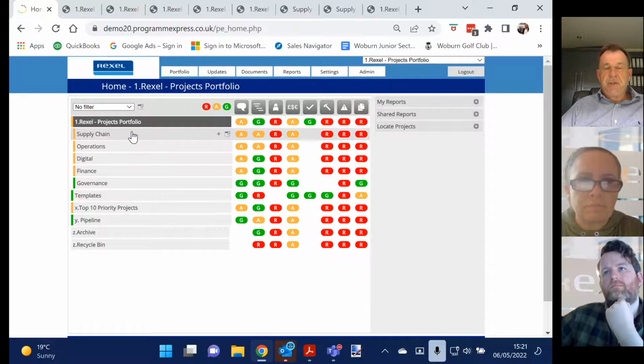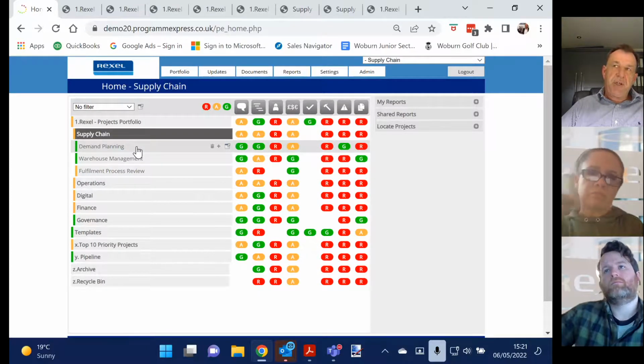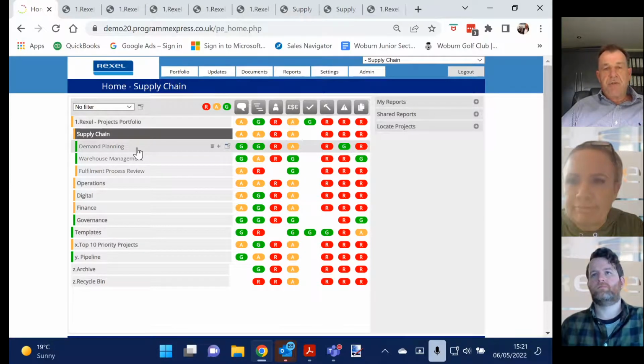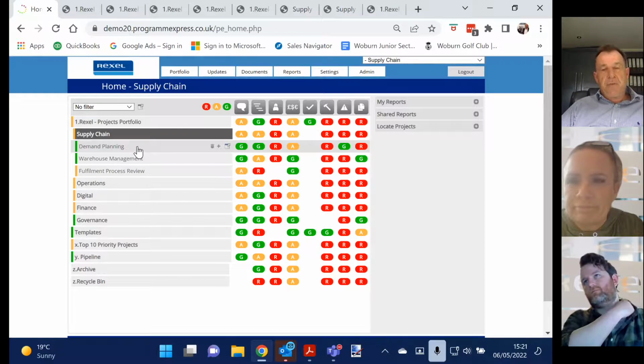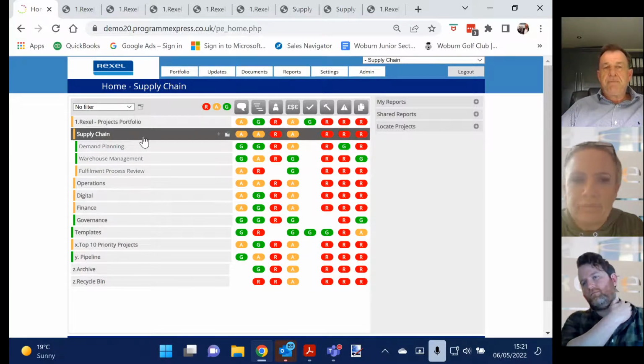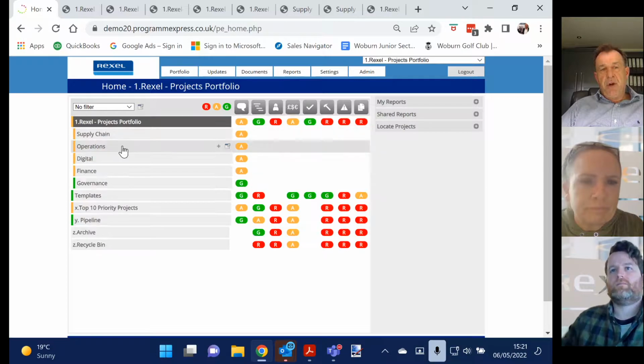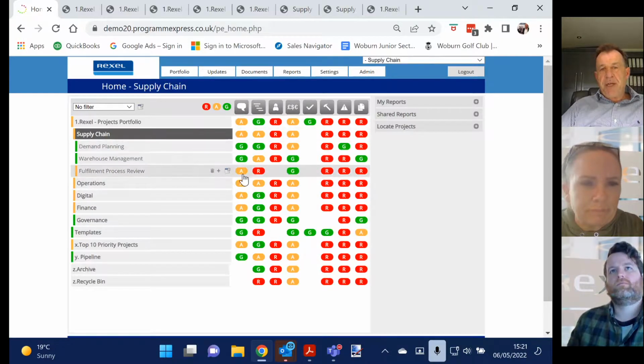It's there straight away. And what we're trying to encourage is that we're not having meetings where we're sharing project status, because people can run that themselves. What we're having meetings for is to look at exceptions, decisions, issues, risks, over budget, those types of things. But of course we expect everybody to populate all of these fields.